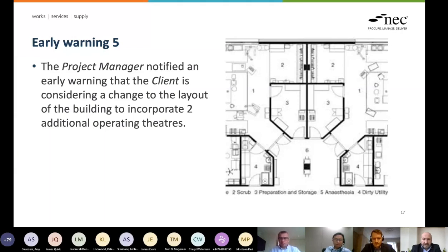Okay. I mean, obviously you've got a concern there about additional cost. So what I can do is instruct Matthew as the contractor to put forward a quotation for a proposed instruction. So we can maybe put that on the table. Hayman, I think I'll need some input from you in describing exactly what that looks like. And in fairness, Matthew, Paul, if you're happy to help me almost write your instruction over what you need me to put into that request for a quotation, that way I'll be asking the right question for you to give the right answer to, which is hopefully in line with our spirit of mutual trust and cooperation that we're trying to engender here.